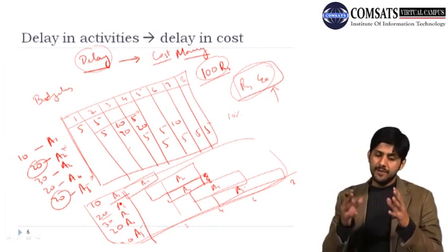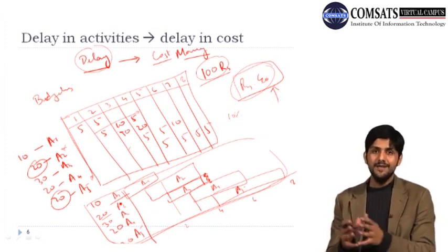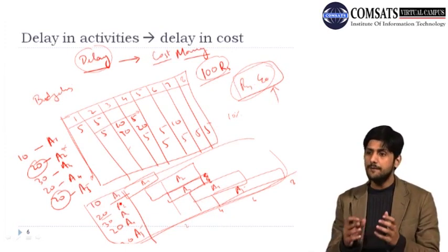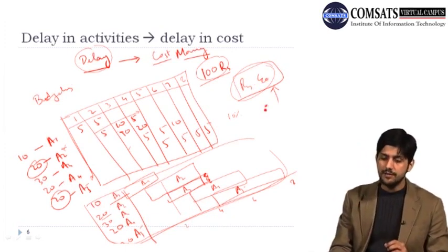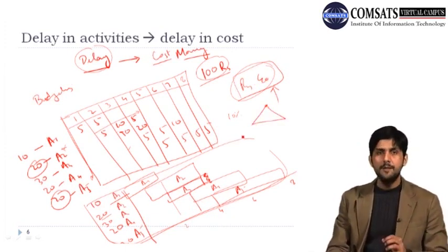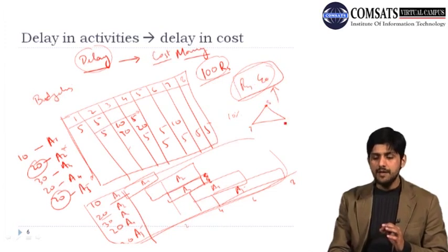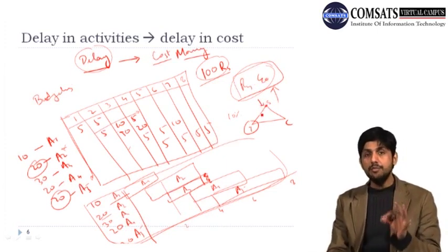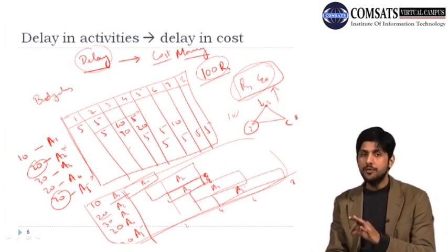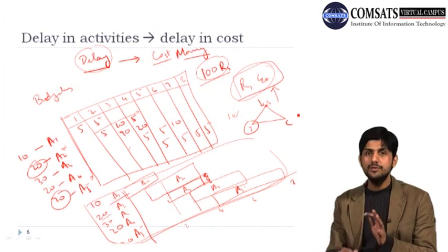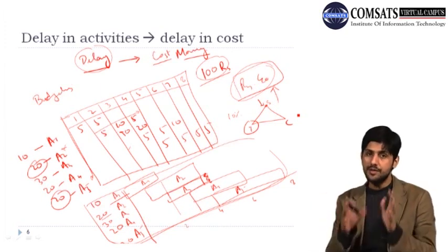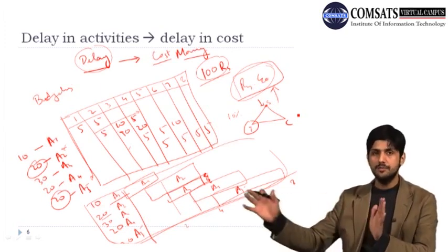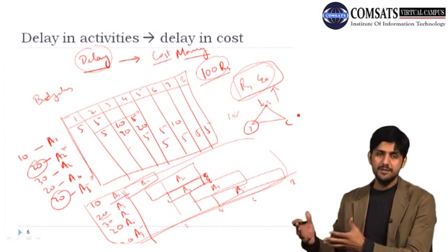And similarly, you also know how much the project would be delayed. That is why we discussed the triple constraints of project management, because at times people are very firm on one value. People would say, okay, I want this change, but I want my project on time, and cost is not a problem. In that case, you fix the time, you deploy more resources, and you try to finish the project on time, but obviously the cost is going to increase.